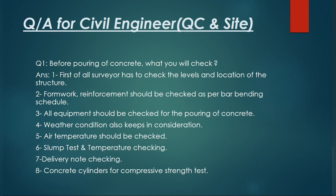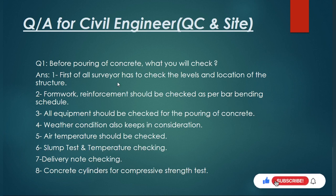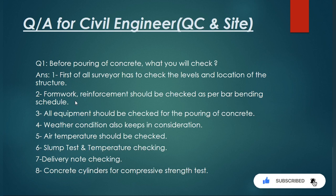Our first question is: before pouring concrete, what will you check? Answer: before pouring concrete, you need an approved survey report. First, the survey team checks all levels and locations of the structure. You also need an approved WIR — work inspection request — for the formwork and reinforcement work.